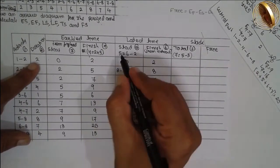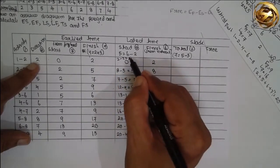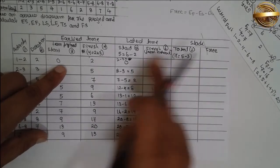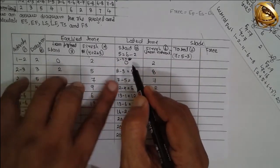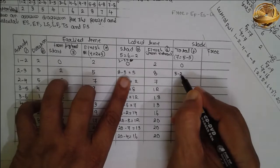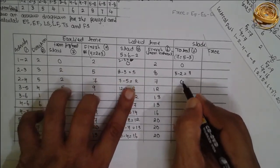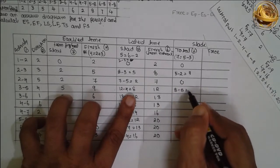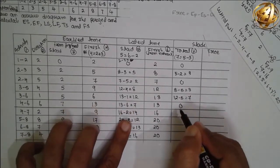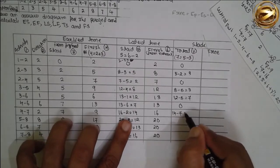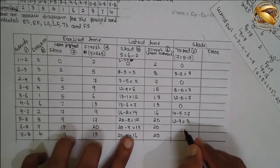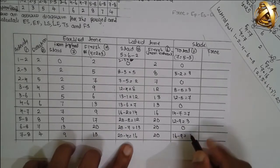Total slack is LF minus EF, or equivalently LS minus ES. Values: 1-2: 2−2=0; 2-3: 5−2=3 (or 8−5=3); 2-4: 7−7=0; 3-5: 12−9=3; 3-6: 13−6=7; 4-6: 13−13=0; 4-7: 16−9=7; 5-8: 20−17=3; 6-8: 20−20=0; 7-8: 20−13=7.